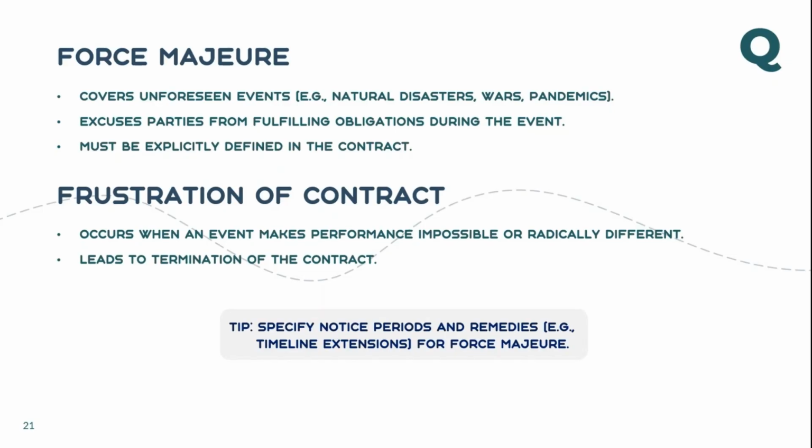In case of force majeure, that means those items identified under the contract. You can see in your FIDIC form or any standard form of a contract, some listed items known as force majeure. So if those events occur, the contract is going to force majeure. There is no way you can proceed with the contract. But if you look into the clauses, you can see some remedies in that force majeure also.